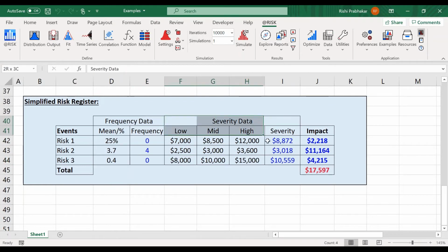In all cases, the severity should be built as the severity for a single instance or occurrence of the event. And then I use compound to model all of them. Okay, and then eventually I have my total, and I know that it's been built in quite a reasonable way. Okay, so apart from exceptions, this is a framework that will cover almost all of your risk modeling needs.